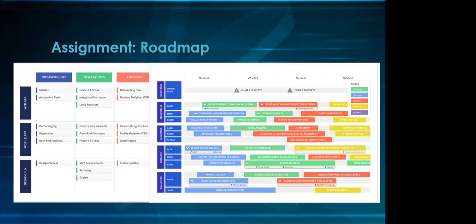You could even break it down so that it just says, okay, homepage will be done by sprint 2. Then the shopping or the sign-in features will be completed by sprint 3. The e-commerce features will be started in sprint 2 and completed by sprint 4.